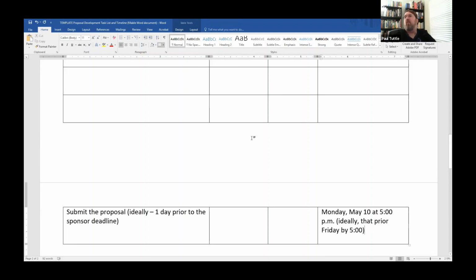And we've already told people through the new Vice Chancellor for Research that they cannot receive proposal development and budget development services during the final 3-day window prior to the sponsor deadline. What they need to be doing at that point is to have finished all of the routing and approval in our Ramsey's routing and approval system, which is the same as Cayuse 424.